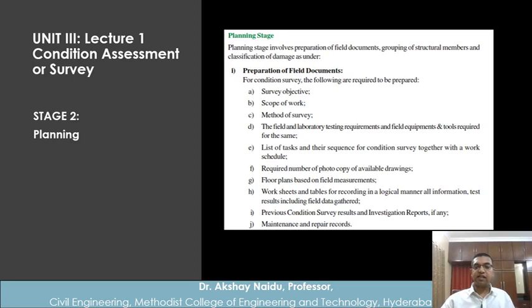List of tasks and the sequence for condition survey together with a work schedule, because it may be a huge building and there are so many areas where we need to examine. So we need to prepare a work schedule. We start from where and where. This planning is important. Required number of photocopies of available drawings,